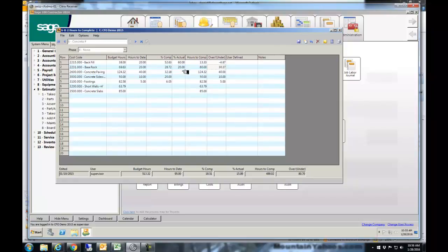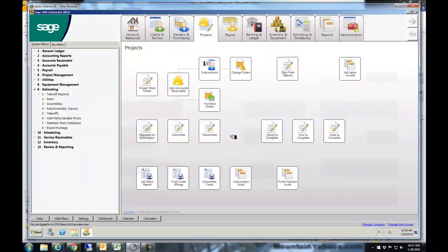And whether you do that or not, as the job progresses, the best thing is once this job is complete, these are all 100. So now the project managers can see how well they hit their month numbers. And also the more important thing is that the estimator that estimated the job can see how accurate his estimate was as compared to the actual numbers that were performed in the field. So it's a great feedback tool for estimators and project managers and controllers and owners and a lot of other people, but it really gives you the feedback on how successful you were on any specific project.